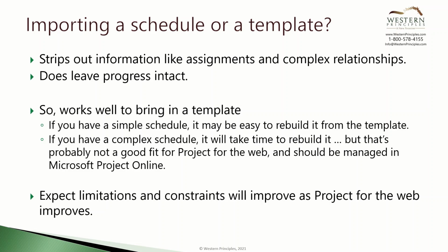Also, if you have a large schedule with more than 500 tasks or 10 levels deep, then it can't be imported. That's probably okay for any of the projects you'd ever manage with Project for the Web. We expect that the limits and constraints on the MPP file import will improve as Microsoft advances Project for the Web.